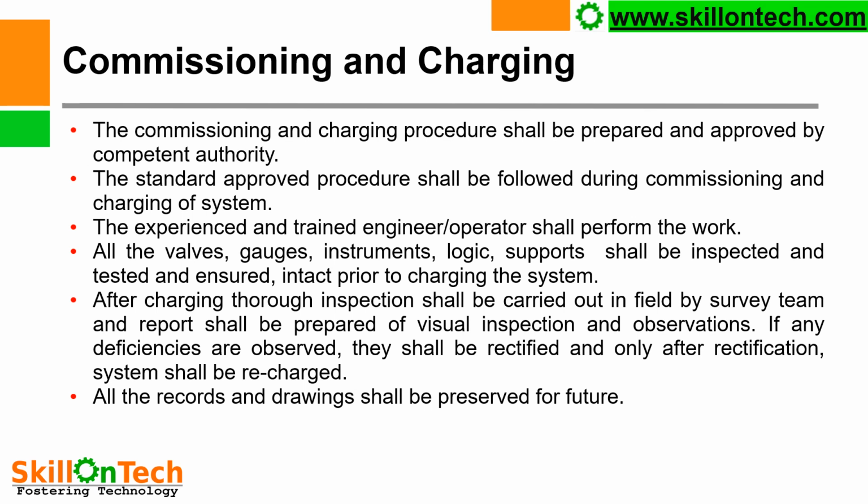After charging, inspection shall be carried out in the field by the survey team and a report shall be prepared of visual inspection or observations. If any deficiencies are observed during the survey, they shall be rectified and only after rectification shall the system be recharged. All the records and drawings shall be preserved for future reference.